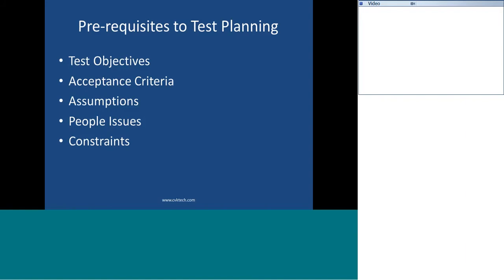Assumptions play an important role when there is an issue or whenever there is an escalation happening at the project level, deliverables and all. So the starting point for the root cause analysis is the assumptions section. In assumptions, we draft something that is not mentioned formally. Those things will be drafted as part of assumptions. And it is important to get approval for all these assumptions.